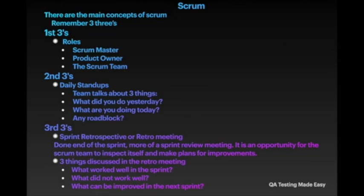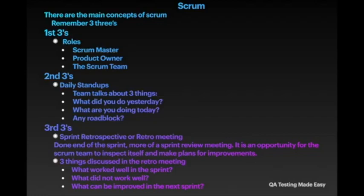The Scrum team is a self-organizing, cross-functional group — developers, QA, design, Scrum master, and product owner. The team has authority to make decisions on how to perform the work, such as breaking work into tasks. Team size should be small — recommended seven to nine people. The second three: daily standups. The team discusses three things: what did you do yesterday, what are you going to do today, and any roadblocks. This covers what ticket you worked on, what you'll work on next, and any blockers.